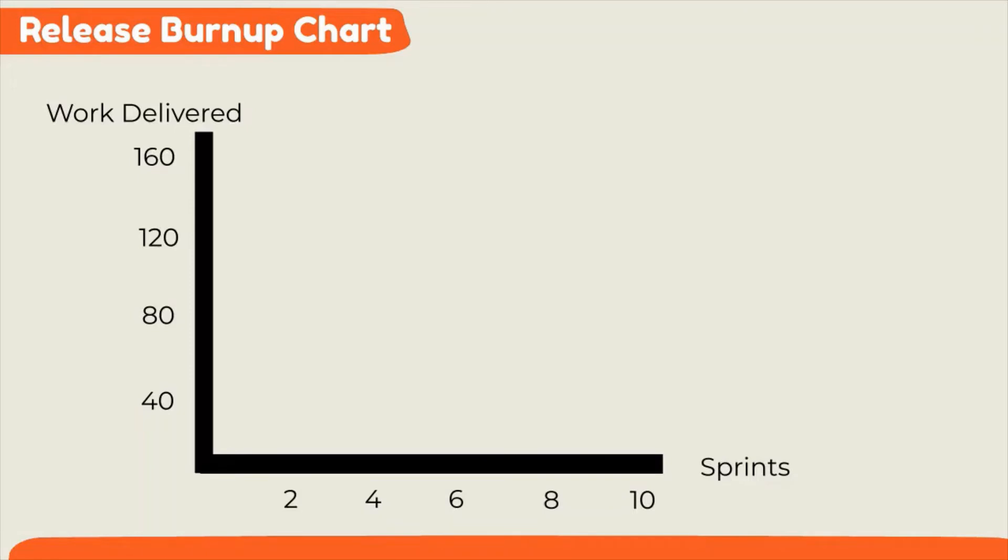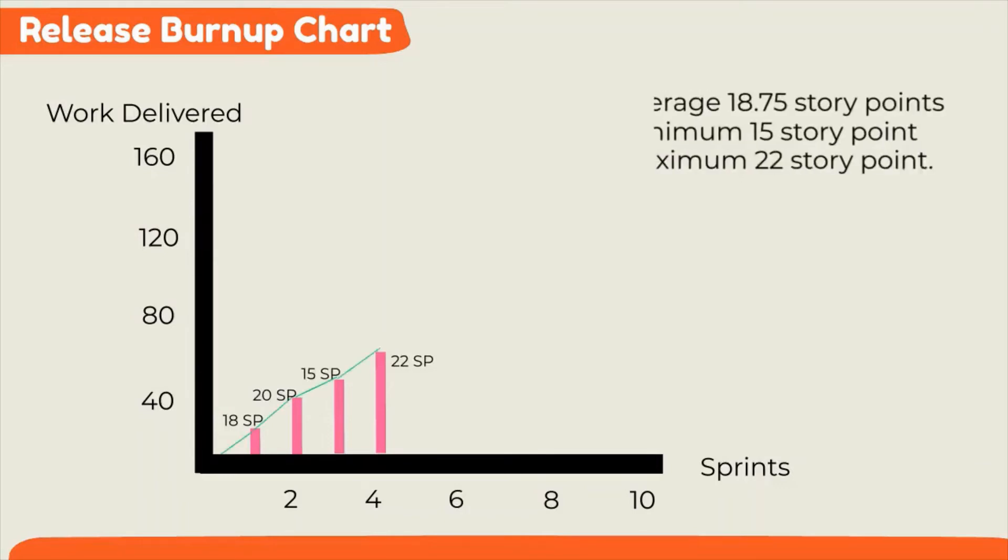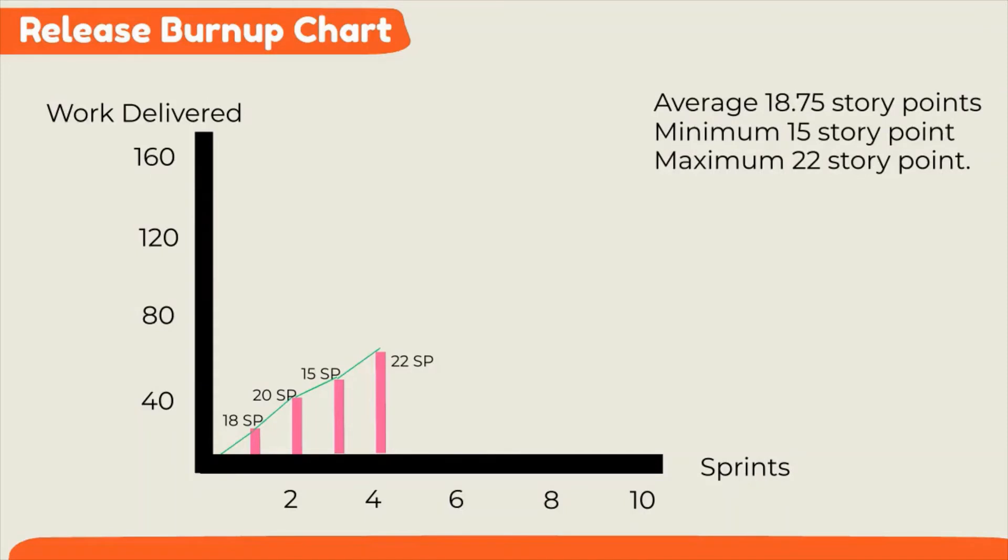Product owner can use this data on the predictability of the team. In this example, the team has delivered 18 story points in the first, 20 in the second, 15 in the third, and 22 in the fourth sprint. We see the team has delivered an average of 18.75 story points, minimum 15 story points, maximum 22 story points.